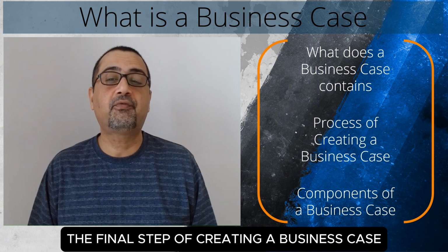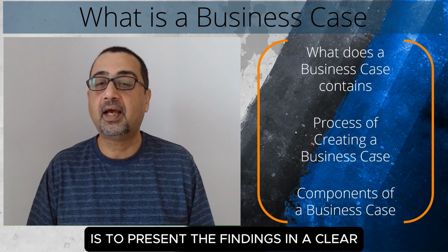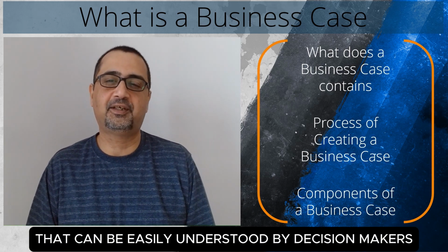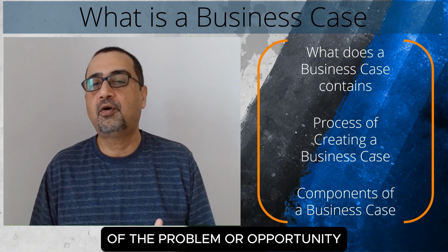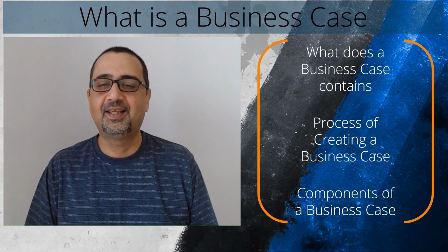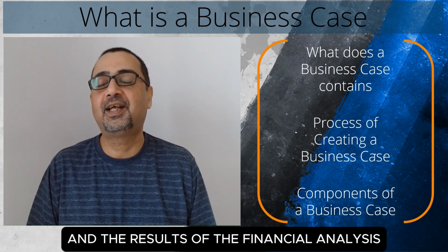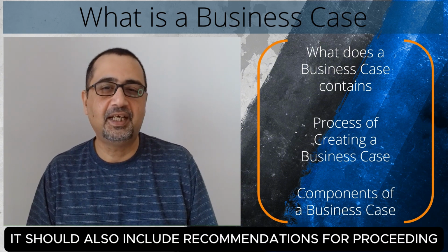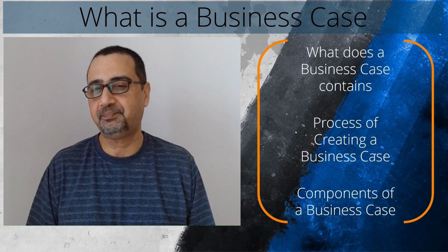The final step of creating a business case is to present the findings in a clear and concise document that can be easily understood by decision makers. The business case should include a summary of the problem or opportunity, the proposed solution, the costs and benefits of the project, and the results of the financial analysis. It should also include recommendations for proceeding with the project or not.